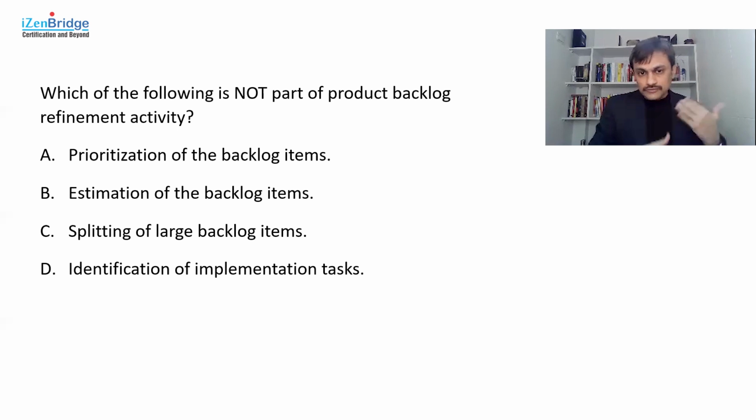So when you are reviewing it frequently, every week, you should not be doing it in the beginning of the project and hoping that this will remain good. And you should not be doing it 3 months in advance. Even if you do it 3 months in advance, you still need to relook at it just before we get started in the next iteration. So even if you do some forecasting, every week or very frequently, you are expected to review it. So you recommend, as a project manager, continuous reviewing of a backlog.